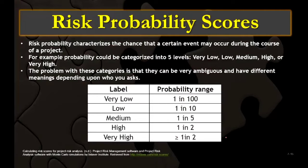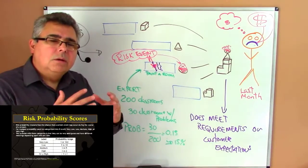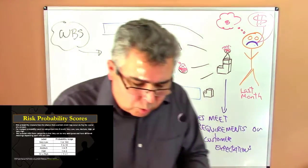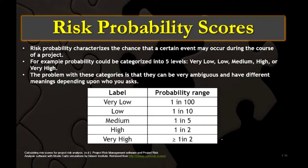Maybe when you have one event in each hundred, the probability would be 1% — I would say that's very low probability. If the probability is 1 in 10, that would be 10% — I would say that's low. 1 in 5 means 20% probability — I would say that's medium probability. In our example, that probability would be between low and medium. We can give numerical scales: instead of calling it very low, we give a scale of 1, or 2, or 3, or 5. A probability scale of 1 means very low; a scale of 2 means low. So that is the idea for probability score.